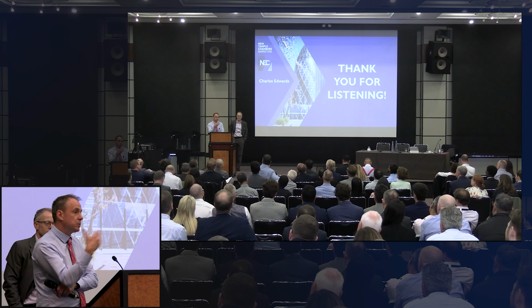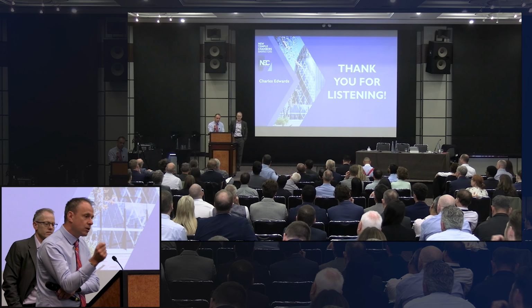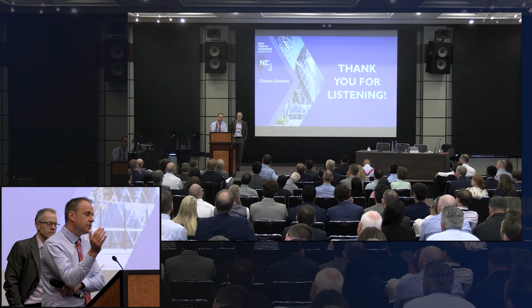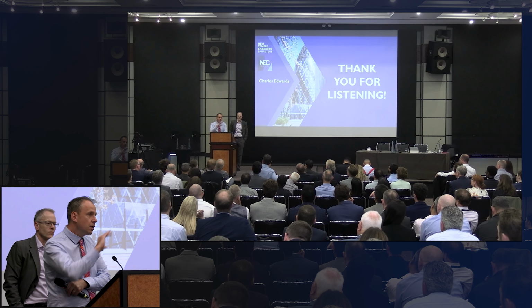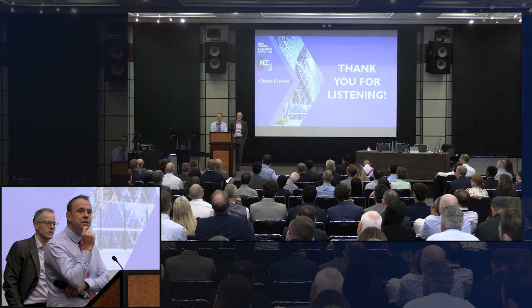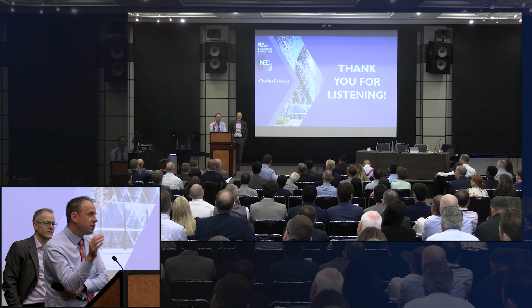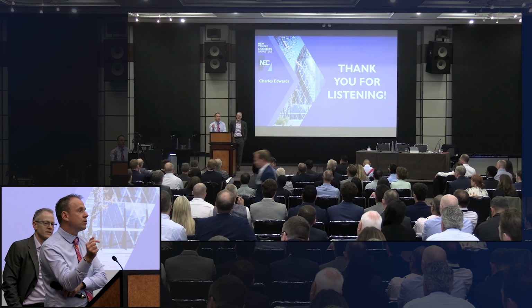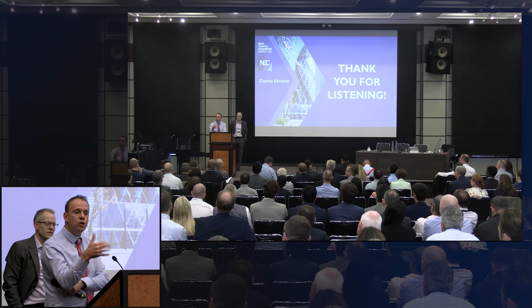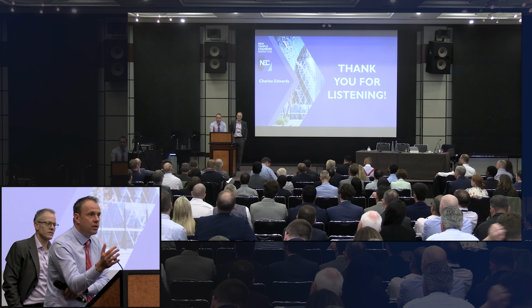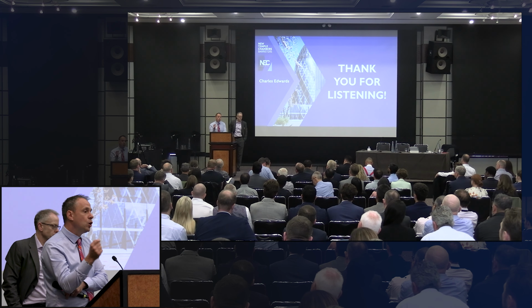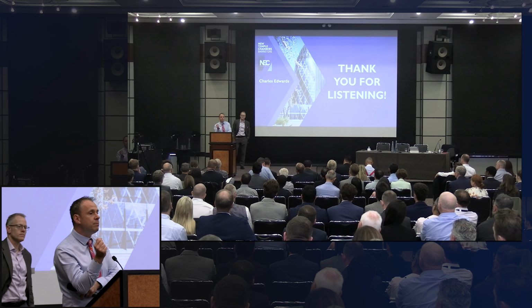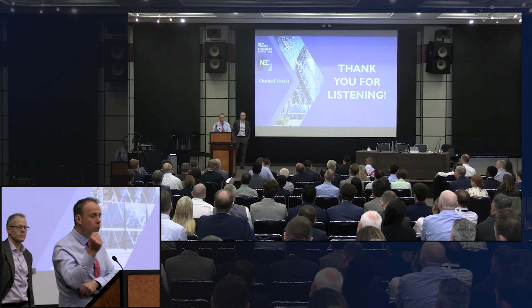If you're a commercial, especially as we've got extra disallowed costs added in, please take the time to write a 1 or 2 page bulletin on your disallowed costs, blow it up to about A2, A1 size, make sure it's all around your office so everyone in your project team knows what constitutes a disallowed cost. Because who's gonna create most of this cost? The operational people, not deliberately, but because they will not know necessarily, especially with the Z clause ones, what would constitute a disallowed cost. Let everyone on your team know what would be a disallowed cost so they can then try and avoid that from happening. So it's a recommendation. But hey, what do I know?